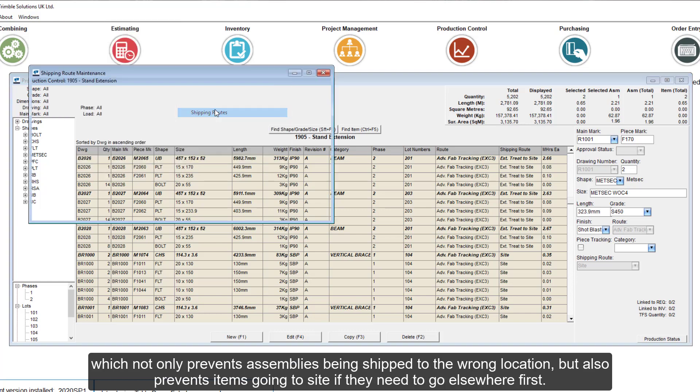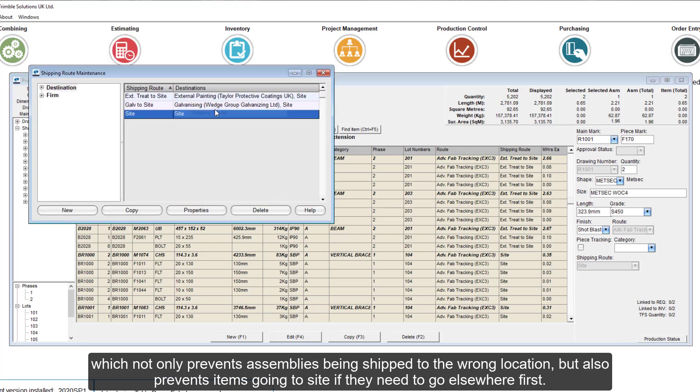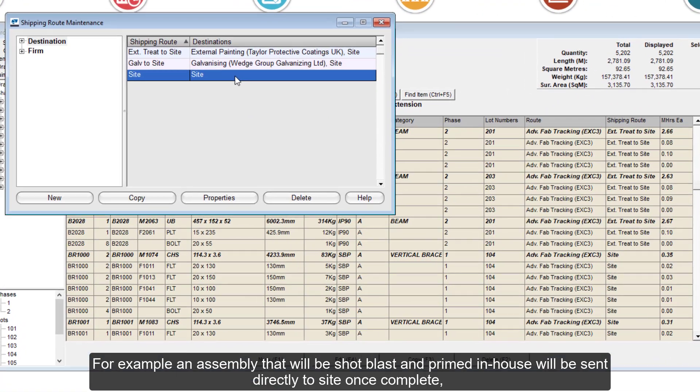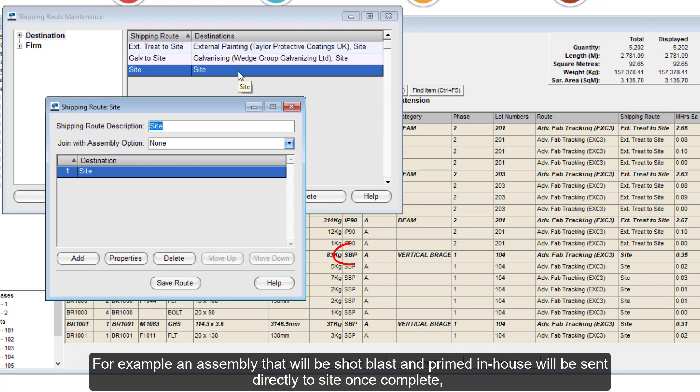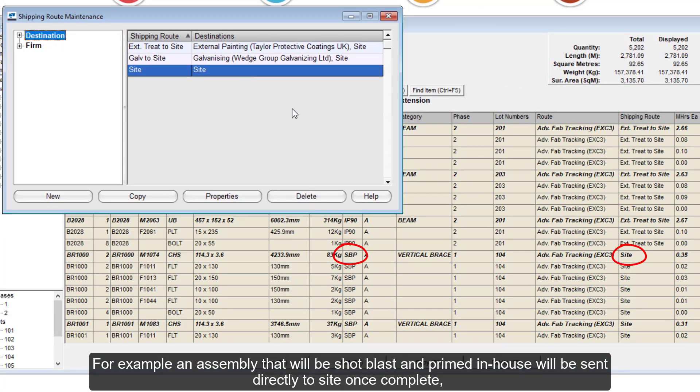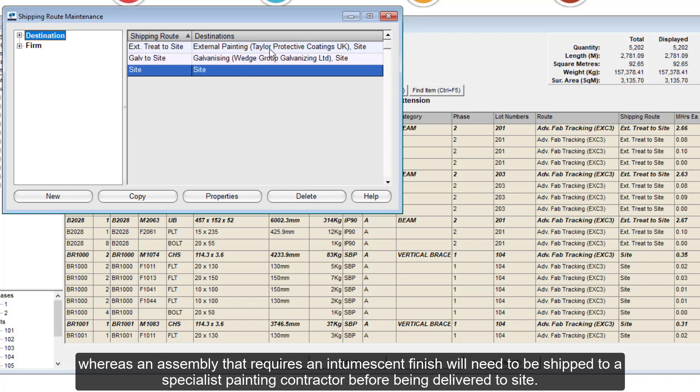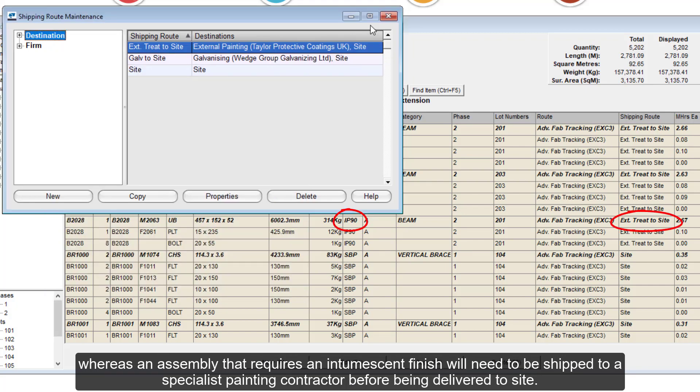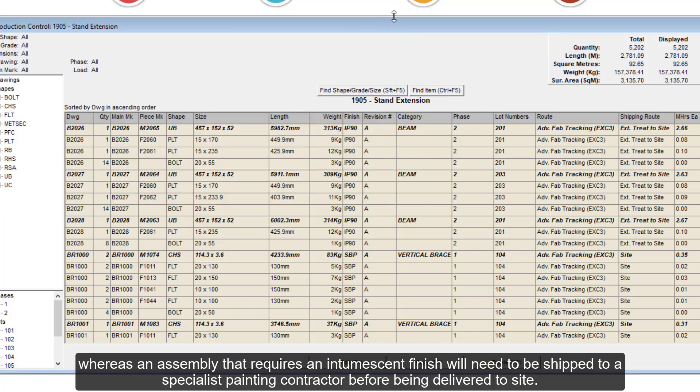This not only prevents assemblies being shipped to the wrong location, but also prevents items going to site if they need to go elsewhere first. For example, an assembly that will be shop-blast and primed in-house will be sent directly to site once complete, whereas an assembly that requires an intermittent finish will need to be shipped to a specialist painting contractor before being delivered to site.